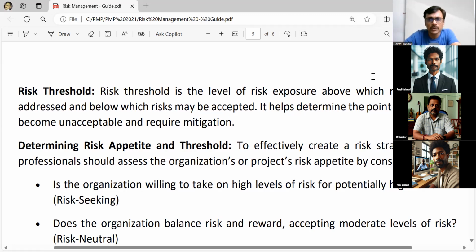But if a risk has an impact of 1 or 2 days, you probably don't have to record it. If the risk has an impact of up to 5 days, you probably have to record it, but monitor it at a local level. Management may not want to look into it very critically. So we are getting clarity about it, so that when I am doing my risk management planning, I am guided by it. I can say, okay, this kind of risk does not require tracking. This kind of risk requires detailed tracking. We call these terms risk appetite, which is like a feeling about risk. This document will be with you, so you don't have to worry about it.